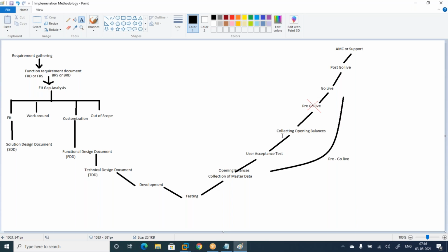Yeah. So, Satya, I will also propose what I've done in the past. Maybe it will benefit us or not, but you can counter my thinking in this. Sure. So what we've done is, right at the place where you've said collect master data, we've collected the opening balances, and then the second spot where you say collect opening balances, we've done the delta. So we've collected the master data and opening balances and stored it in a separate environment, a conversion environment or some sort of repository.